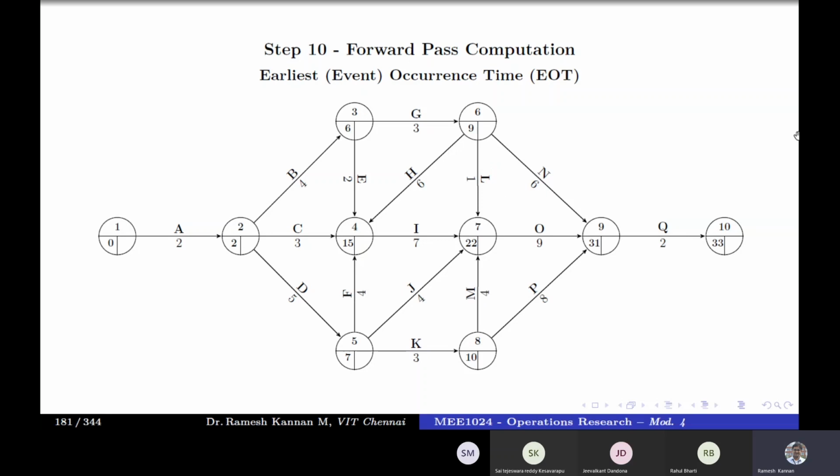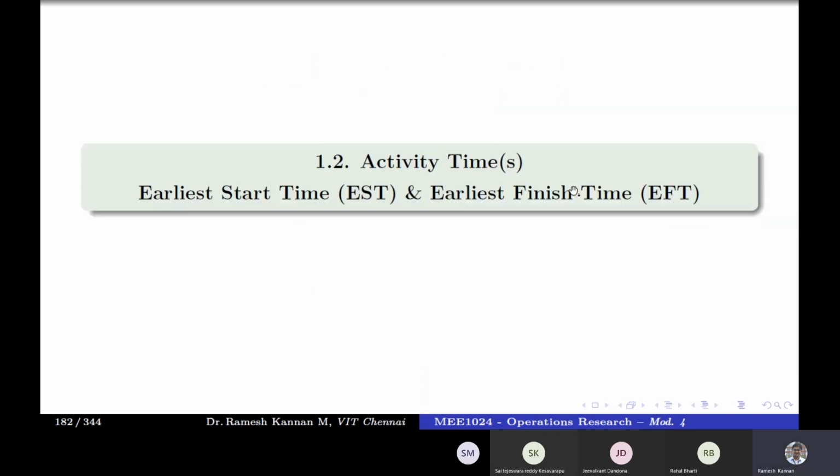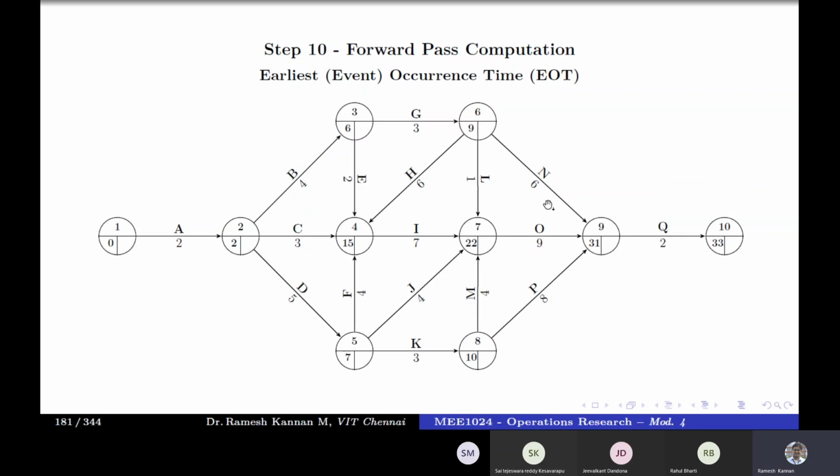So in an examination, out of hurry you get a different value, but when you check the critical path is different, then some calculations might have gone wrong. Okay. Then we have done the event times. Next is the activity times, the EST and EFT. So once you find EST, you can add duration to find EFT. In a forward pass, we'll be looking at the earliest start time.